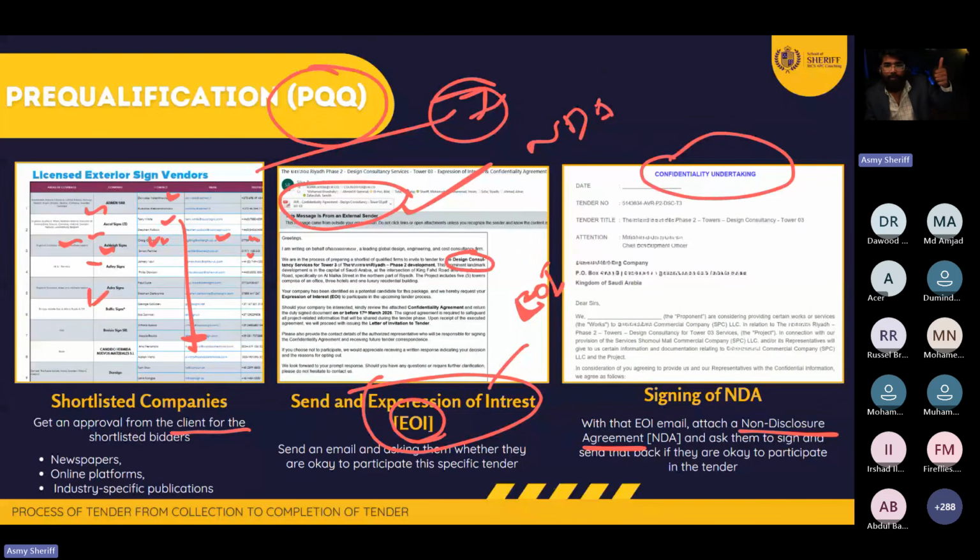You're going to check the shortlist of people. Normally, the shortlist will go from 8 to 6. That's a normal range, but it depends on the client. Maybe if we give 20 people, the client may select 15 people, or the client may select 12 people. But most of the time, the shortlist will come around 6 to 8. That's it. That's a normal range.